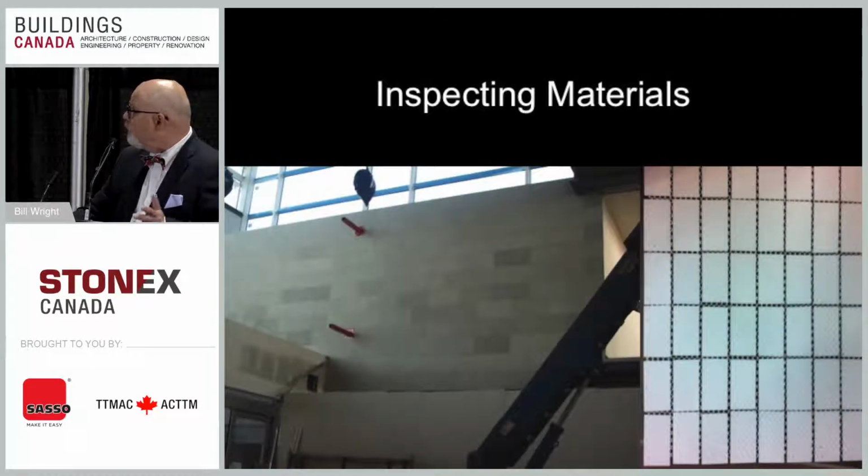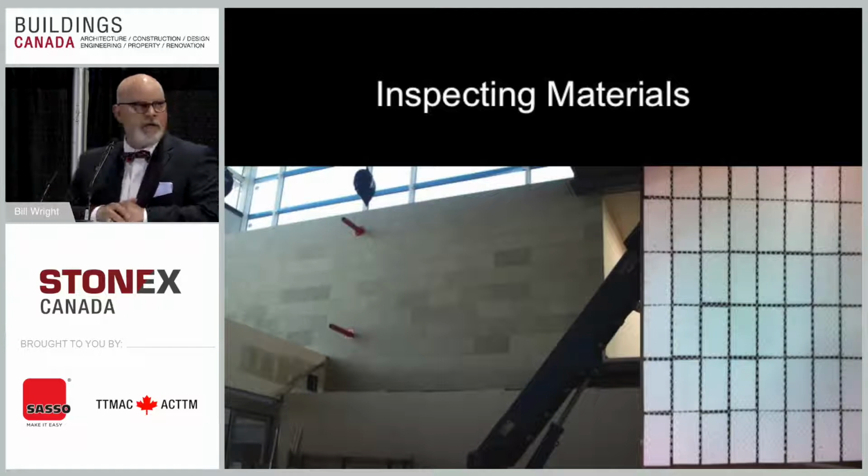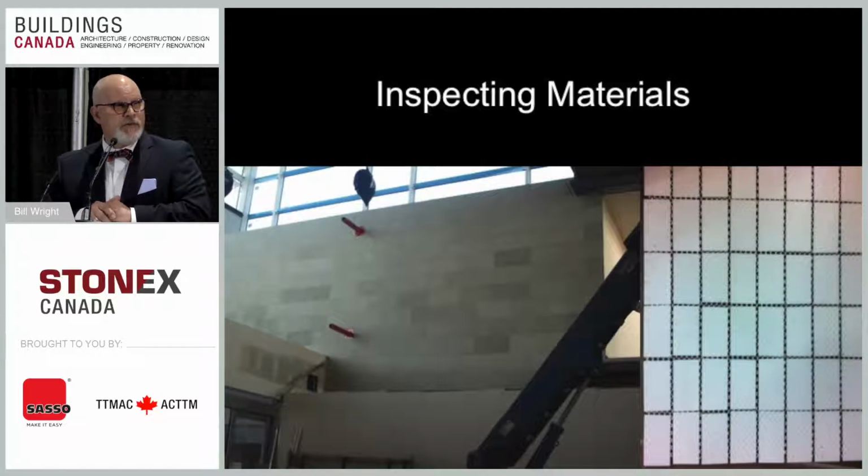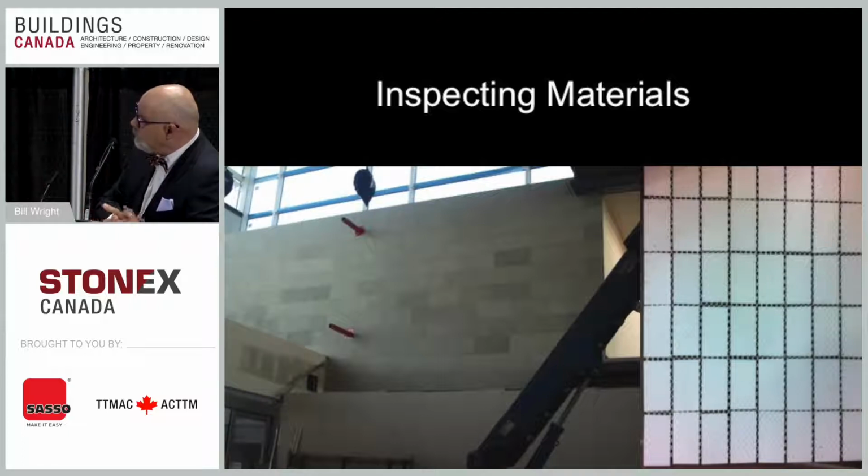Inspecting the materials, the one on the left is a stone that varies. The installer didn't have any room on site to just scatter them together to have a nice even distribution, so he took them out of the skid and up on the wall, and you got lights on the bottoms and lights, darks, and mediums in the middle. The alternative was that he had to rip out a bunch on the bottom and the top and put in more mediums and darks. Okay.